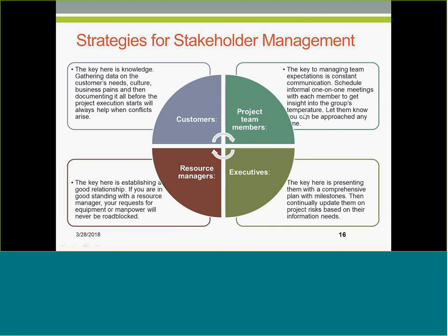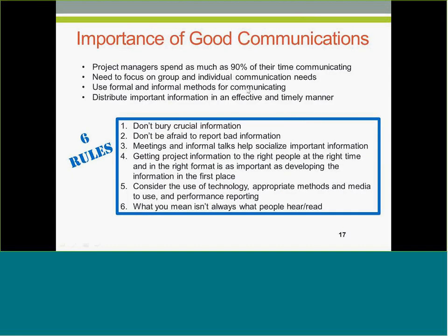So let me drive home the point that communication is absolutely vital. 90% of what project managers do is communicating, believe it or not. So this also means there are 6 crucial rules here. You don't bury information that's crucial, and especially you don't ever bury bad information. It is good to get risks or problems out on the table, and at the same time show that you have thought about possible solutions.